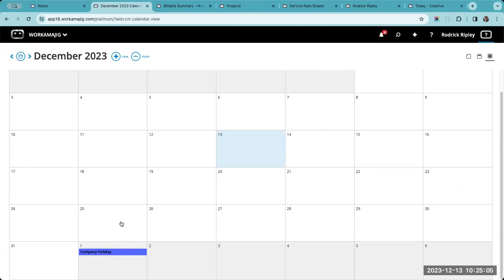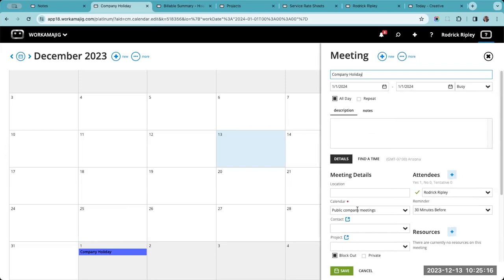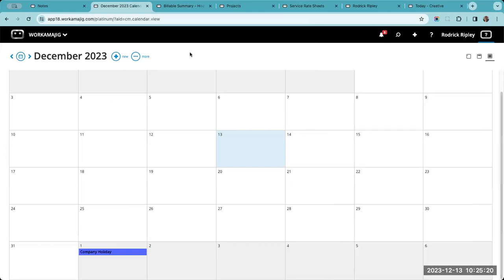So at the very least, I highly recommend you do this. Put in your company holidays in the Workamajig calendar, if nothing else. But make sure that you put them on the public company meetings, blocked out all day. That way, when your users start creating projects in the new year, and they're creating projects in the future, they're going to be able to resource them and plan them better, because now these days are not going to be schedulable days in the schedules of the projects.